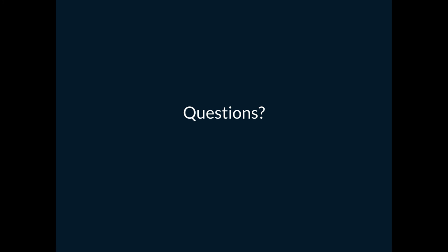Another point to make is, if we estimate 8 and after 4 we know, oh my God, it's actually going to take 40, just stop at 4, go back to the client and say, we were completely wrong about this. I understand that's really frustrating, but let us know if you want to proceed, and if you don't, that's totally fine. We will eat those 4 hours.